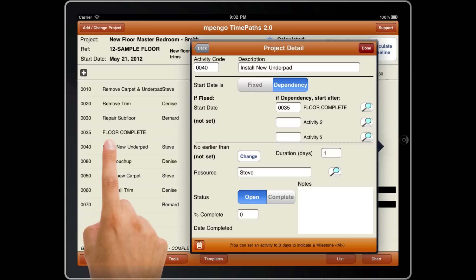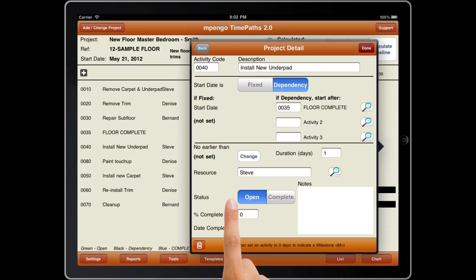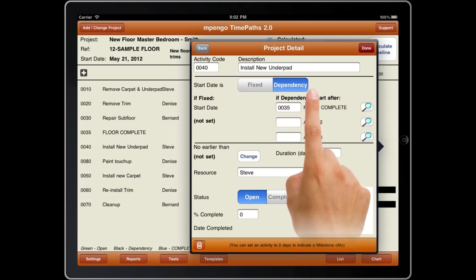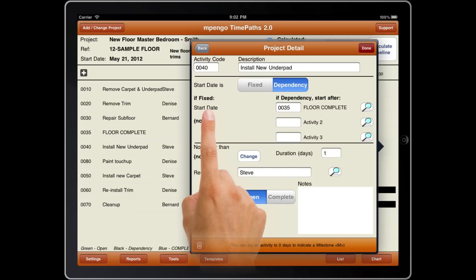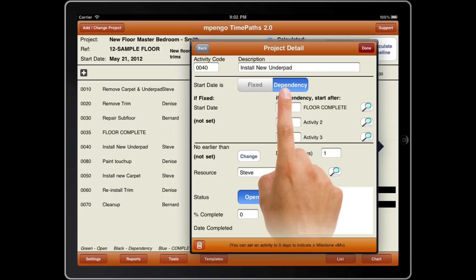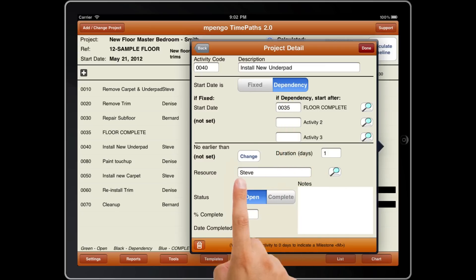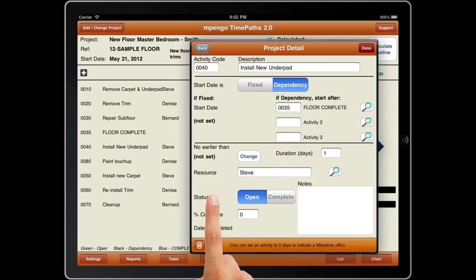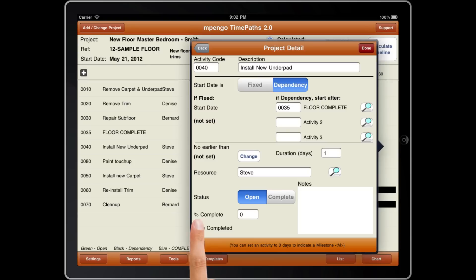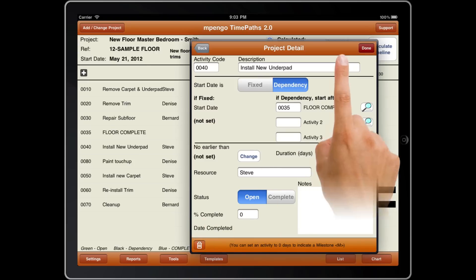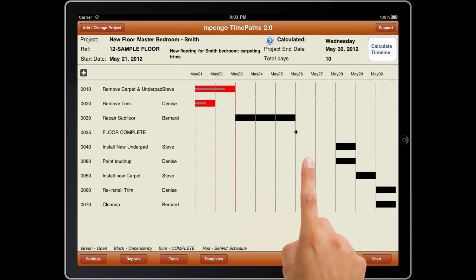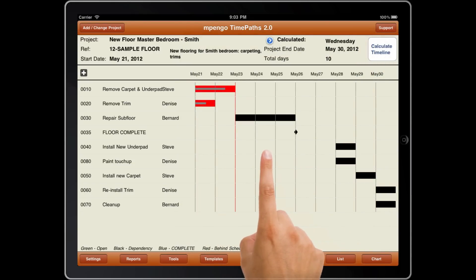Tap Align or Add to update your activity details or schedule. You can indicate a fixed starting date or dependencies. You can enter a resource or responsibility for later resource analysis. You can declare percentage complete for an activity. When you tap Done, your time path is updated and the adjusted schedule is worked out for you.